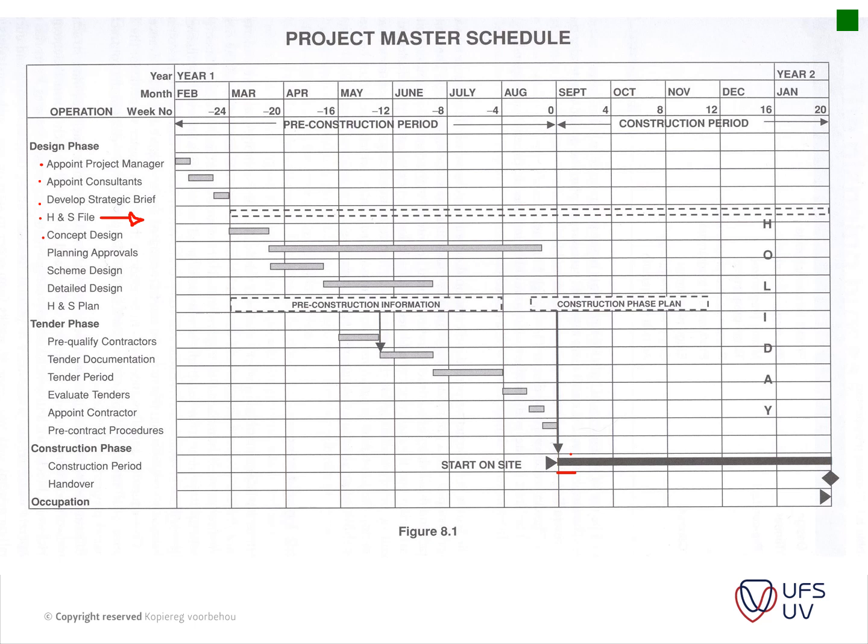Usually the health and safety consultant is only appointed after the tender document, and then suddenly, okay, we need a spec, and let's phone a friend and get a spec quickly and slot it into our tender document. I've got a tender that's going exactly that way now, because the clients don't really realize how important it is to get your health and safety consultant appointed from the get-go, and it's actually law.